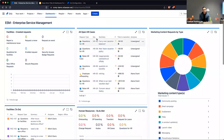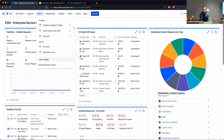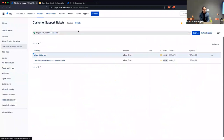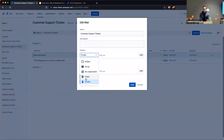Making a dashboard public gives non-authenticated users the ability to access the dashboard, but if you want the information in the dashboard to also be publicly available, you need to configure the source of that information accordingly. For example, with a filter results gadget, you'd need to do two things: set the Browse Projects permission to allow the public to view that project, and also make the filter driving the gadget publicly available — not just private to you.